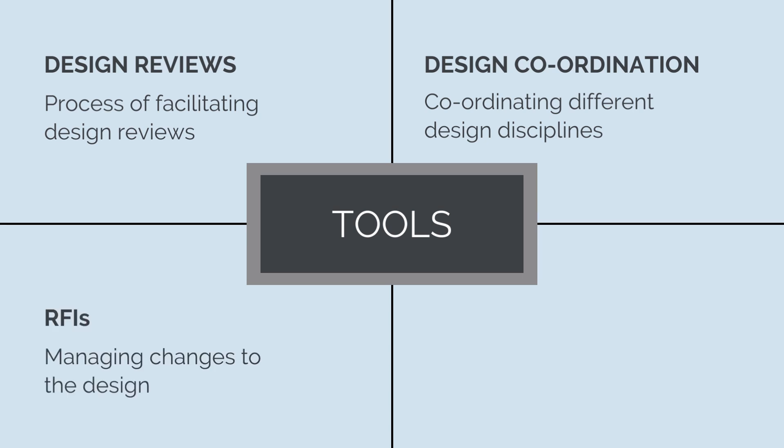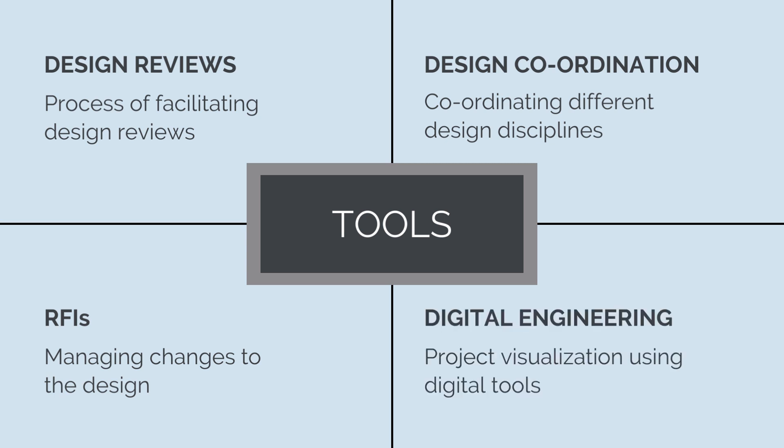RFIs, or requests for information, are the change control process we follow to ensure changes to the design are captured, approved, and controlled during the construction phase. And Building Information Modeling, BIM — BIM technology enables efficient design coordination, clash detection, and visualizing the project in a virtual environment.